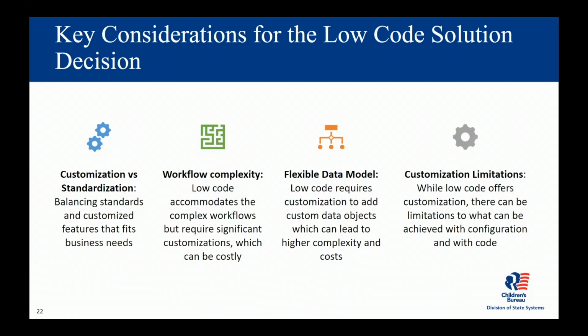And if that ends up being successful, then the rollout depends on the agency's preference. It can be rolled out in production in the same way as other projects. It can be rolled out to a set of users or within a set of counties as parallel processing, or it can be rolled out to the entire user base. So I hope I answered your question, but the first step is the pilot, mainly to see how easy or flexible the low code solution is to customize and extend. And rolling out to a subset of users or the entire user base depends on the agency's preference.